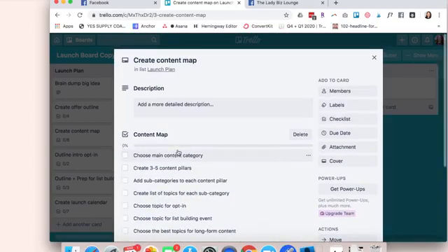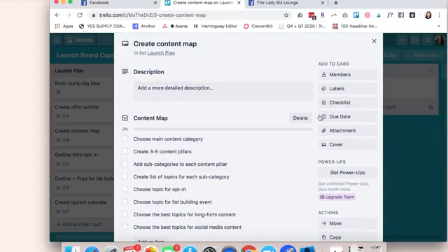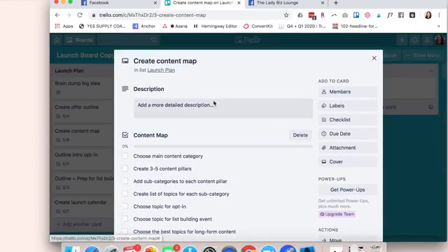And then once you're done with that, you would obviously have due dates. So once I know my launch date, I give myself an 8-week period. I've been talking about that this week, and the free 8-week launch calendar breaks down the 8-week launch. I typically like to say, okay, I'd be mentally prepared, workload prepared to start planning this launch on this date. And then I'll give myself a week for the plan phase, and just start adding due dates to things as they come.